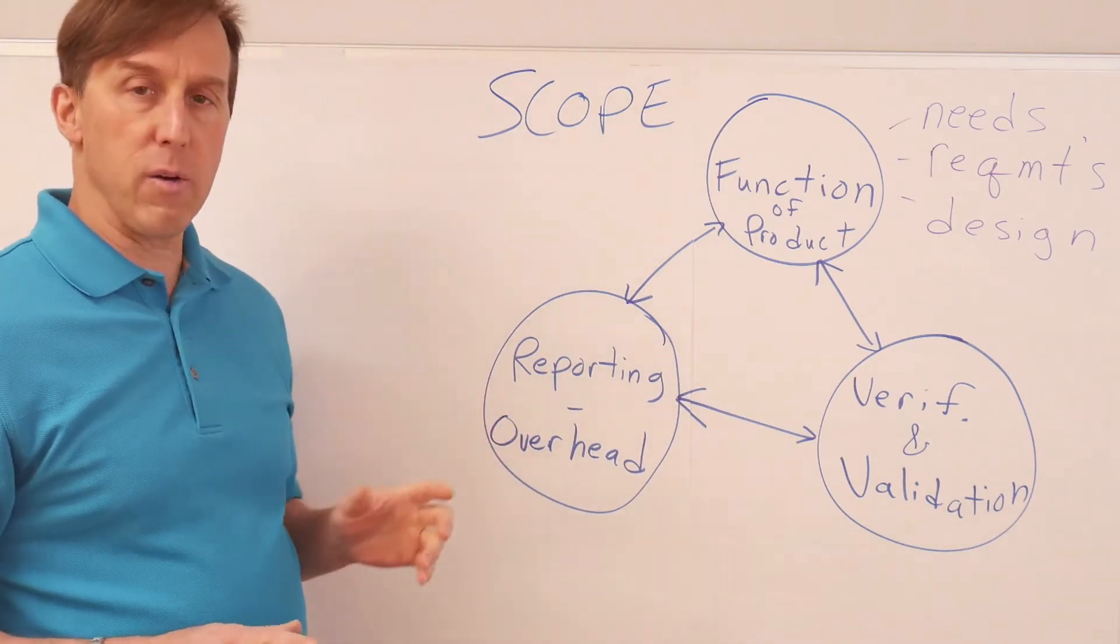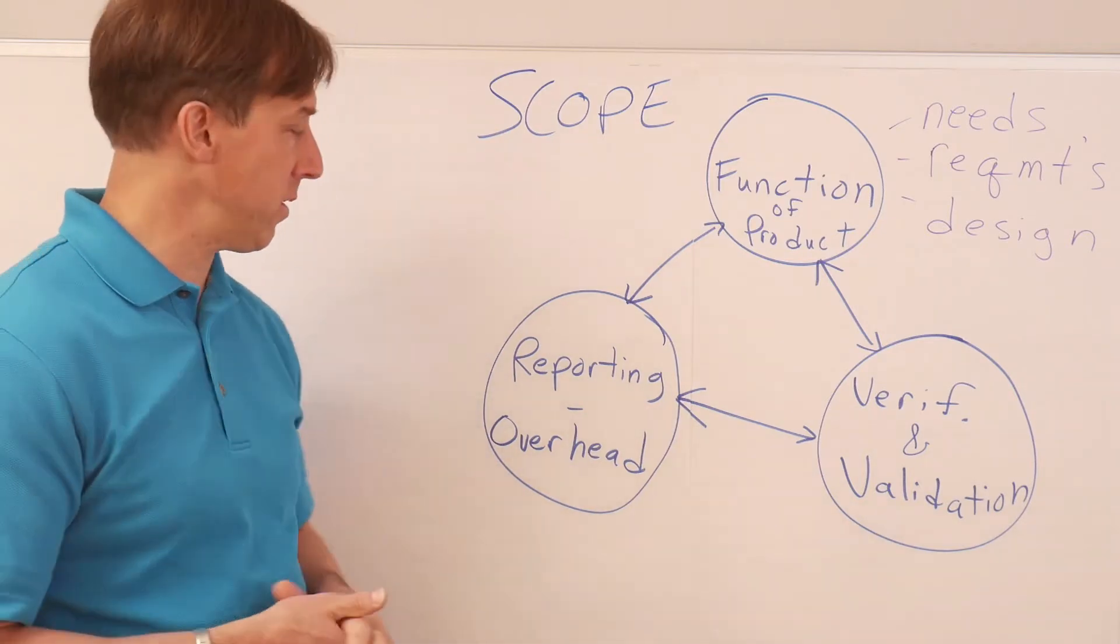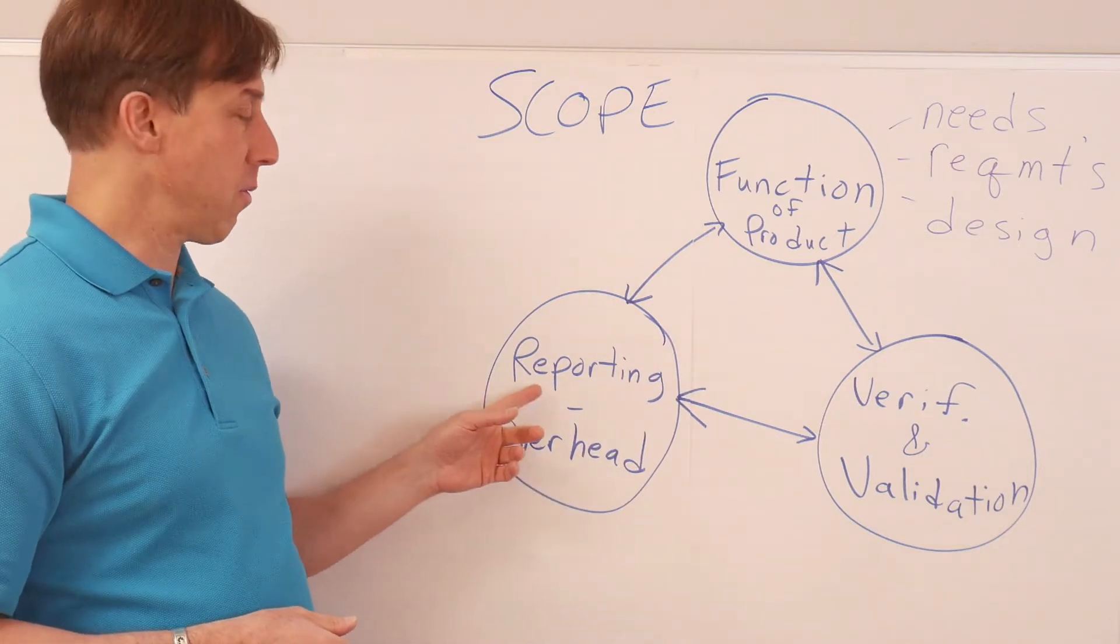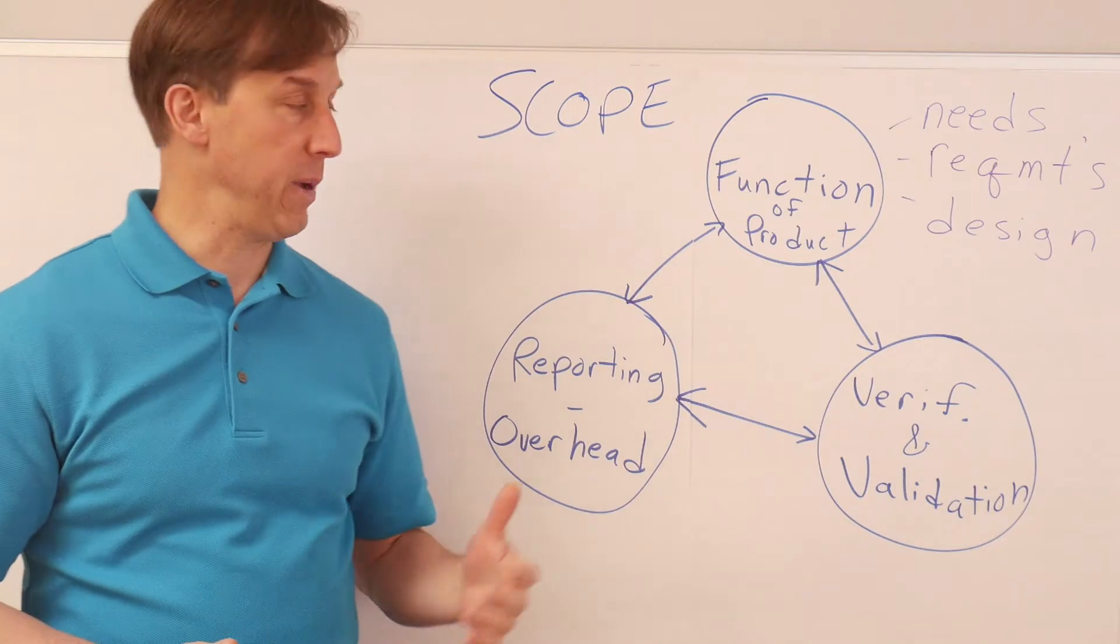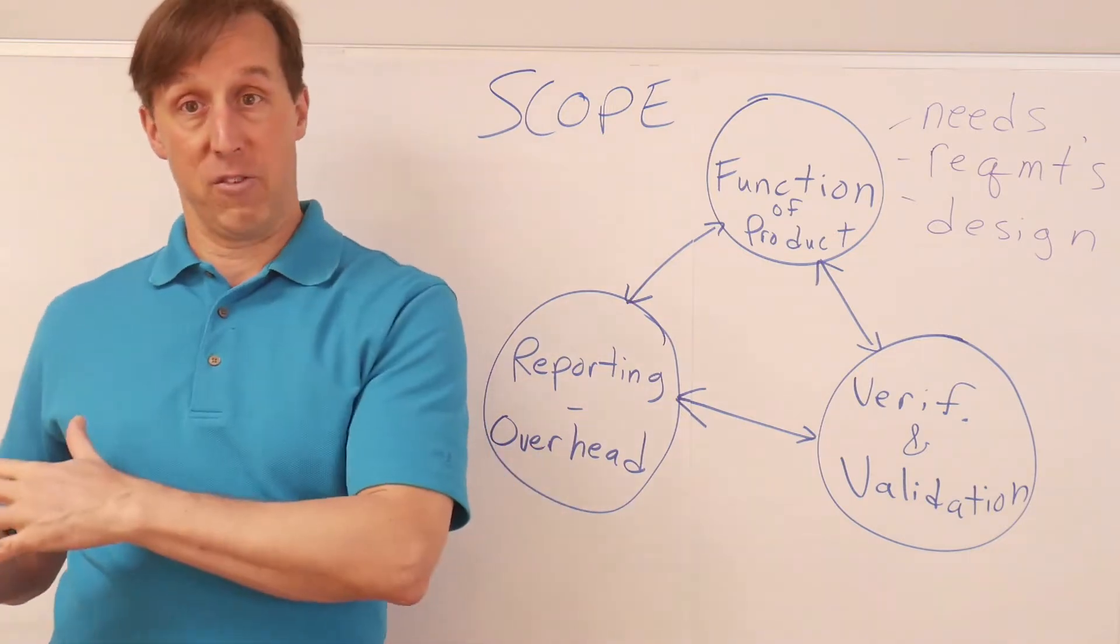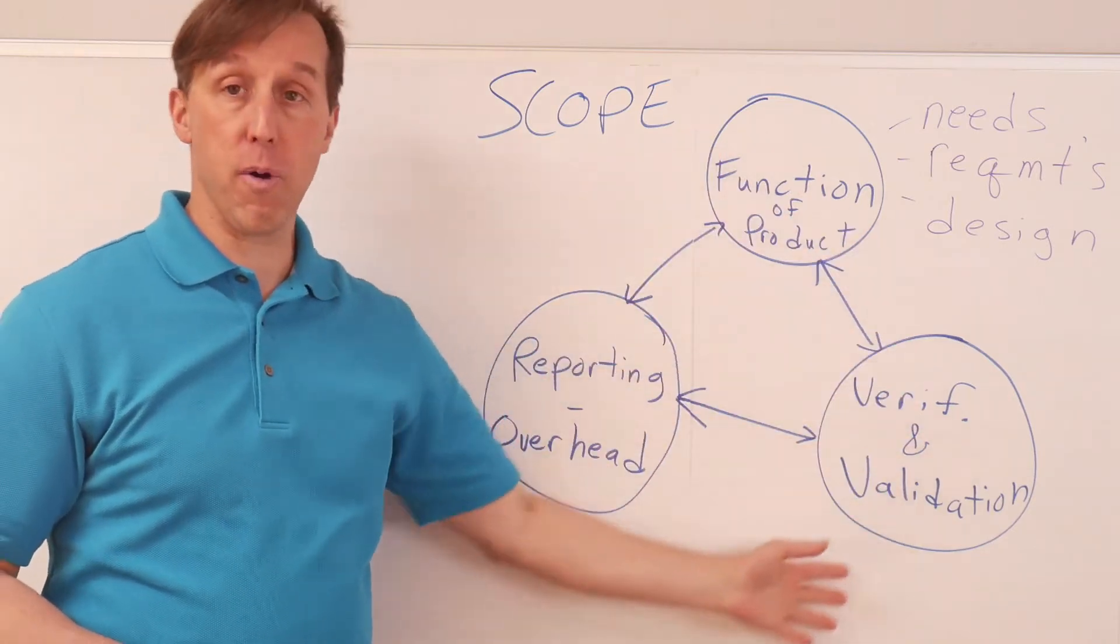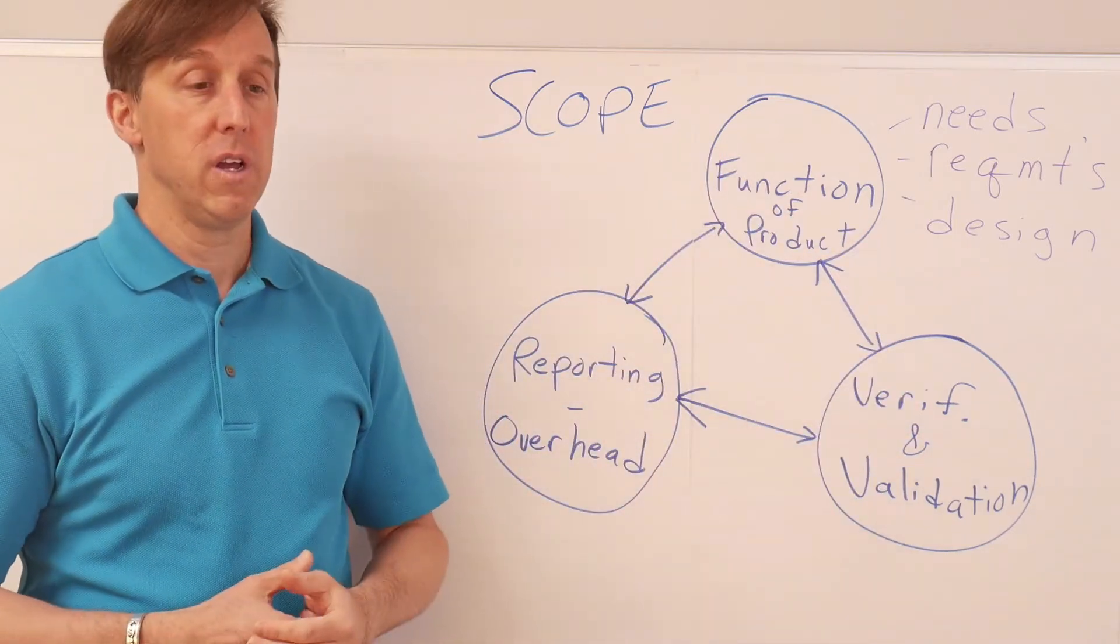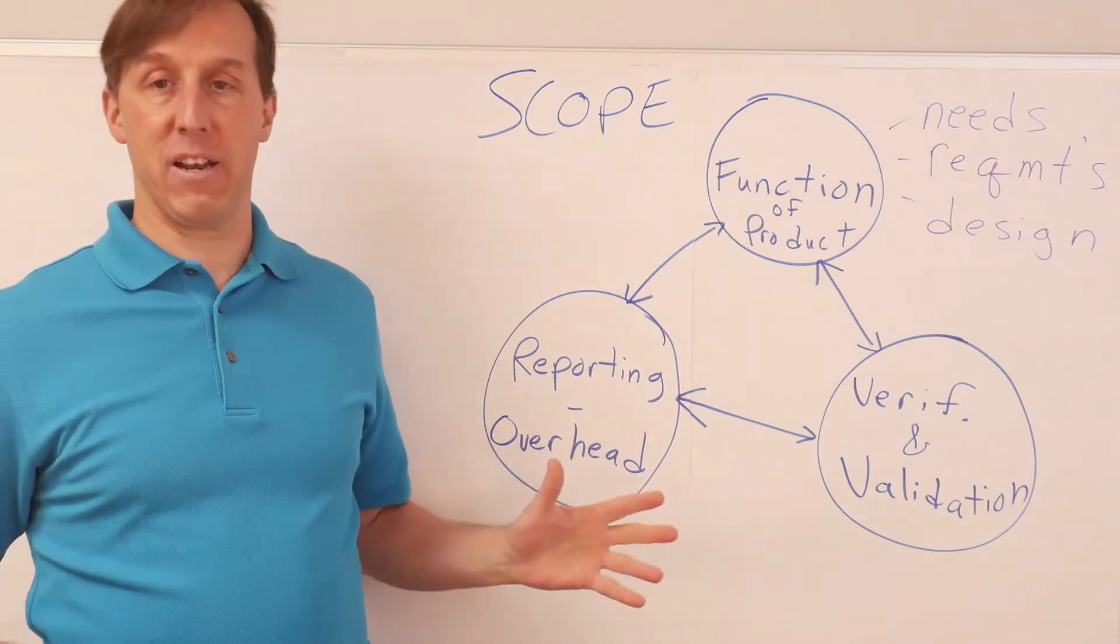The third part, which should not be the biggest part of it, but does need to be included, is reporting and overhead. So reporting, I consider your earned value, your project management. That's different than line management, but perhaps part of your scope, part of your project, needs to account for paying some overhead, and that overhead is what pays line management.